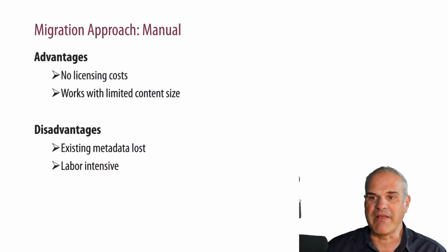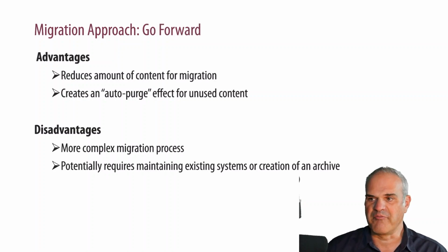You could also migrate manually. The biggest benefit is here there are no costs on the tool side, on the licensing side, but you would lose maybe also metadata, which is precious. It's very labor intensive because you don't buy tools, but you have to do everything on your own with your staff. And it only works with limited content size. Other approaches would be like go forward, where you just reduce the amount of size and you would just migrate the pure files and nothing more, and you would just scope out a lot of complex topics.